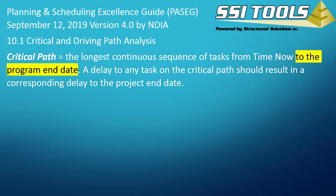Critical path is defined as the longest continuous sequence of tasks from time now to the program end date. Program end date is the key here. If you delay any task on the critical path, you also delay the project's end date.